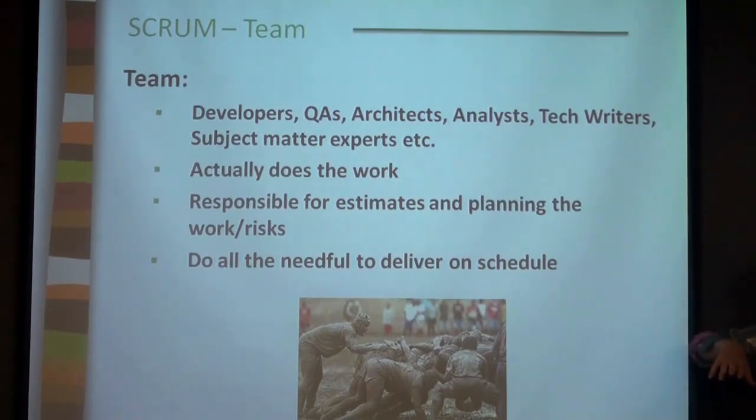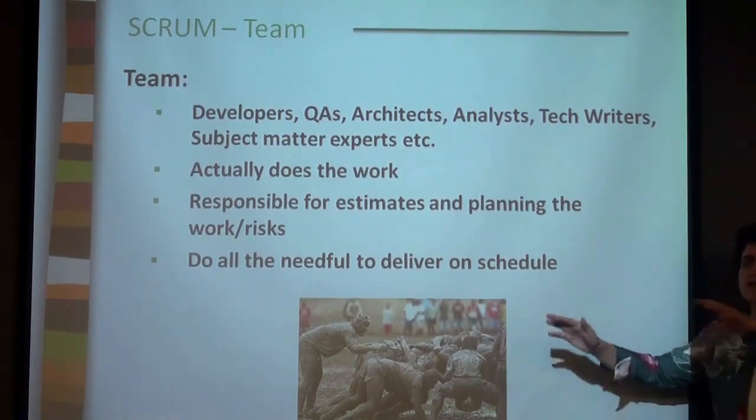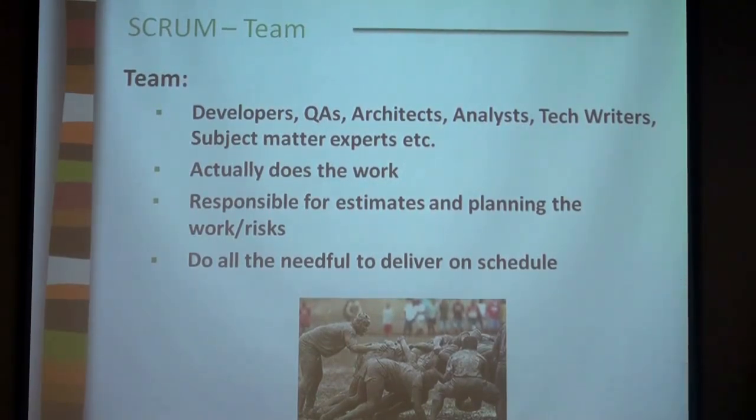So you have to trust your peers, you have to trust your team. And as I said, it may be challenging in some situations to reasonably project the effort that's needed for development and testing, but still, you may miss in a couple of first sprints, but eventually, usually by the third or fourth sprint, people get to know the subject better, and they are more responsible in planning. And most of the Scrum teams, by the third or fourth sprint, get into a release train, and they keep up with the planned releases.